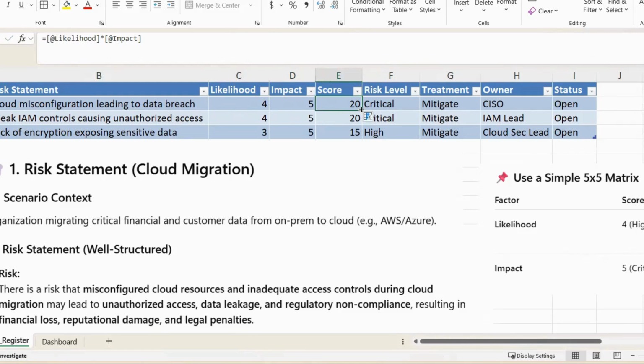And we could also filter this formula here as well. Awesome. And in this case, once we have this score of 20, this would equal critical or high priority, which requires immediate execution. And this is being done at the simplest level. So these are the various risk levels, and you could also apply formulas in terms of determining what is critical, but we're keeping things simple for you to get those basic ideas. And of course, as I've mentioned, I will always reiterate, you can explore the more advanced courses that I've developed that deep dive into all of these elements.